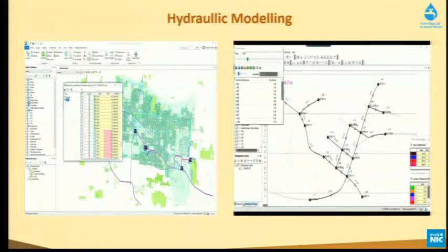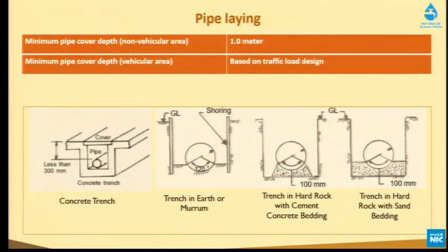We have done the analysis on some projects. If I'm going for manual design without optimization, and once we go for hydraulic modeling, at least I can save my cost by 20%, 30% by using the right hydraulic modeling techniques. Next, please. Here I would like to focus on the pipe laying things.